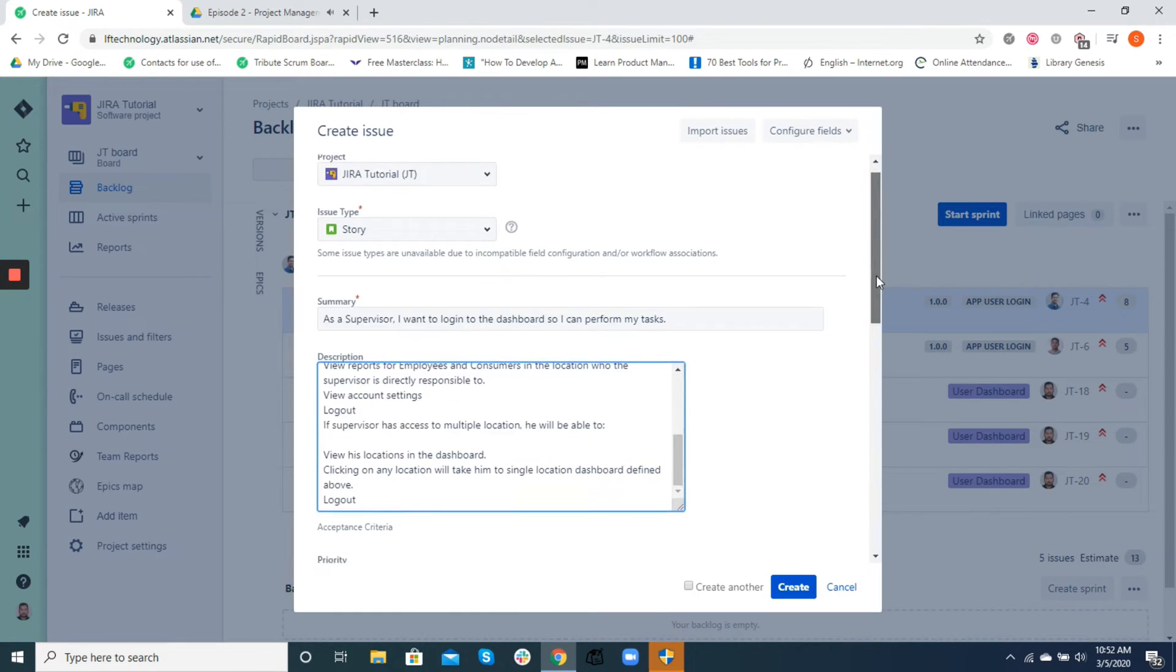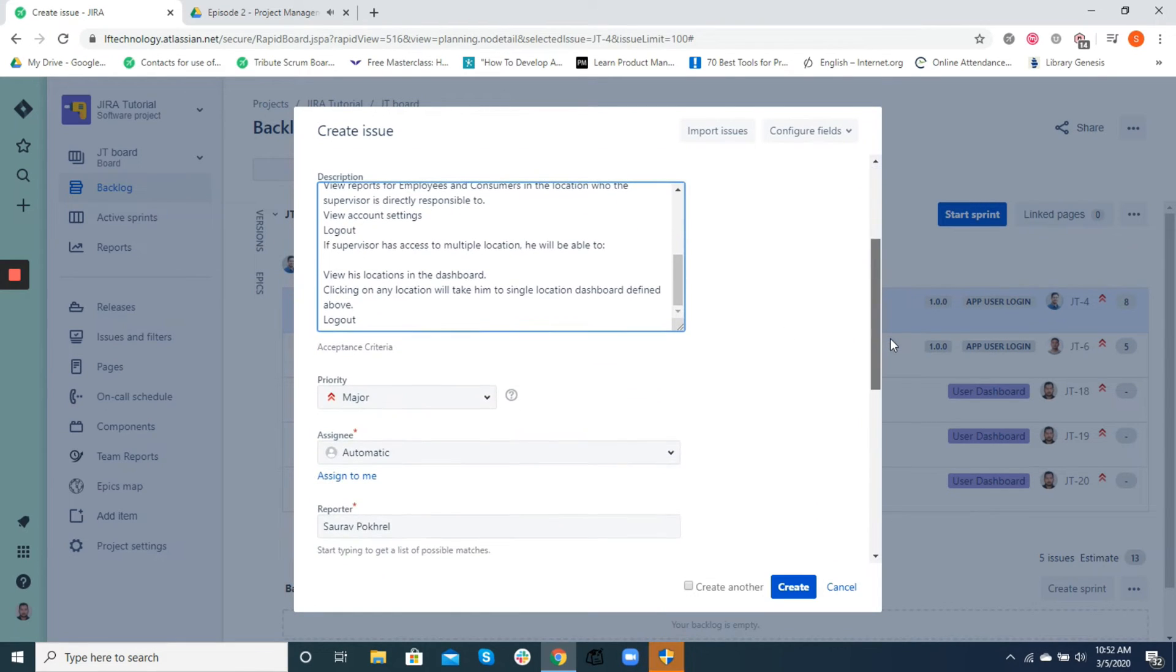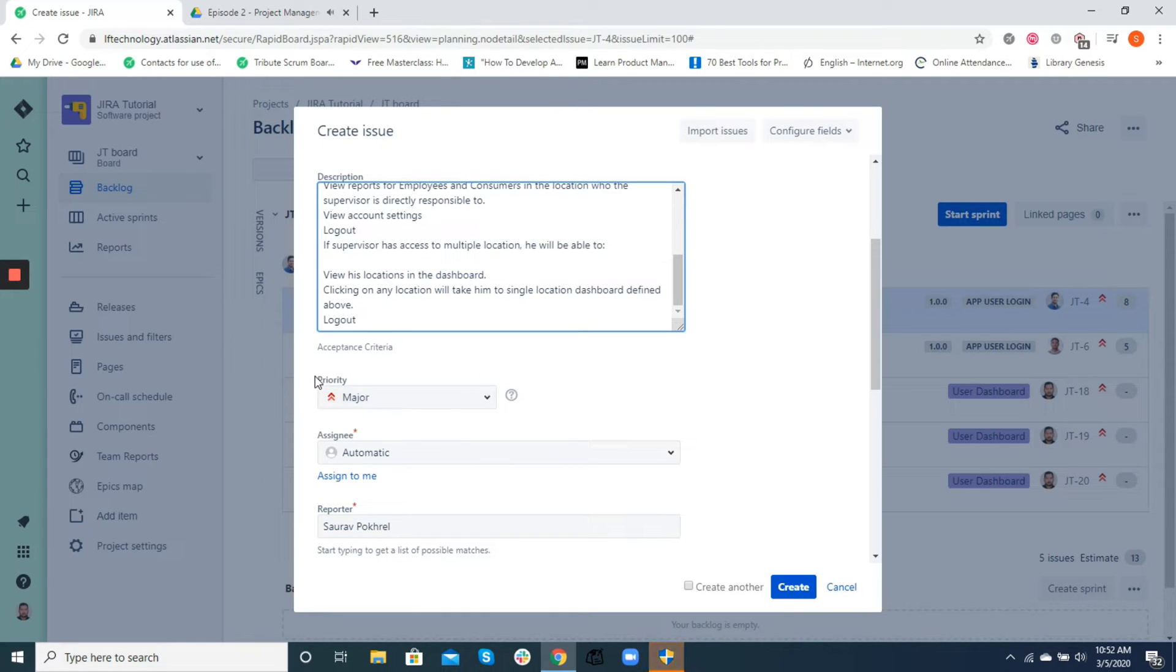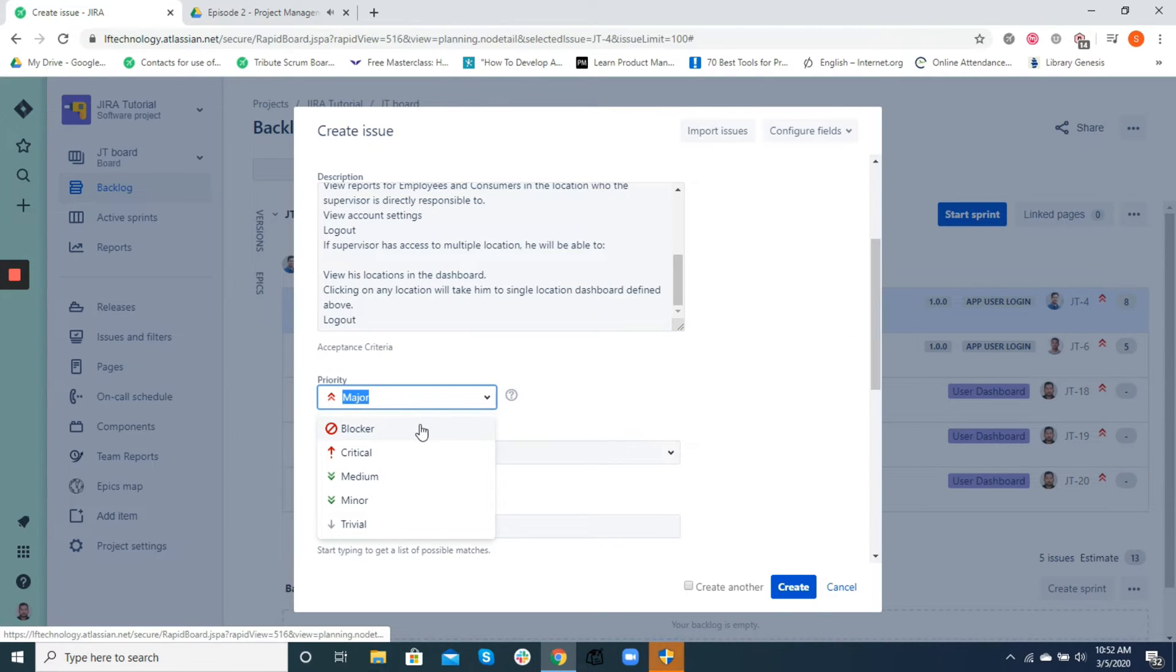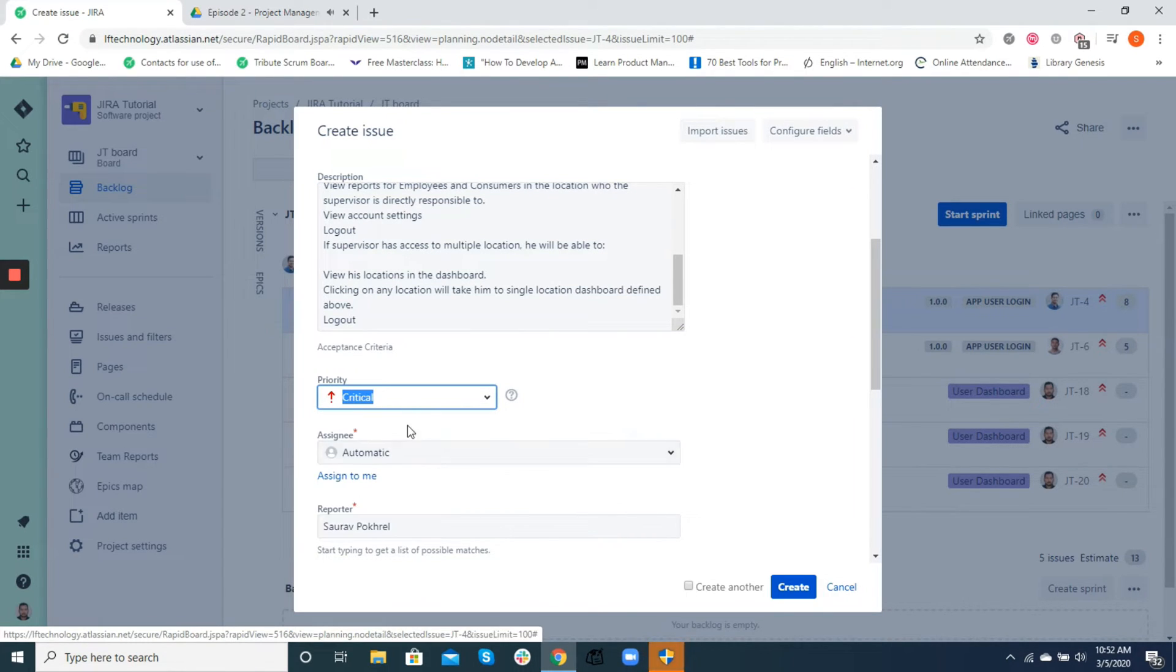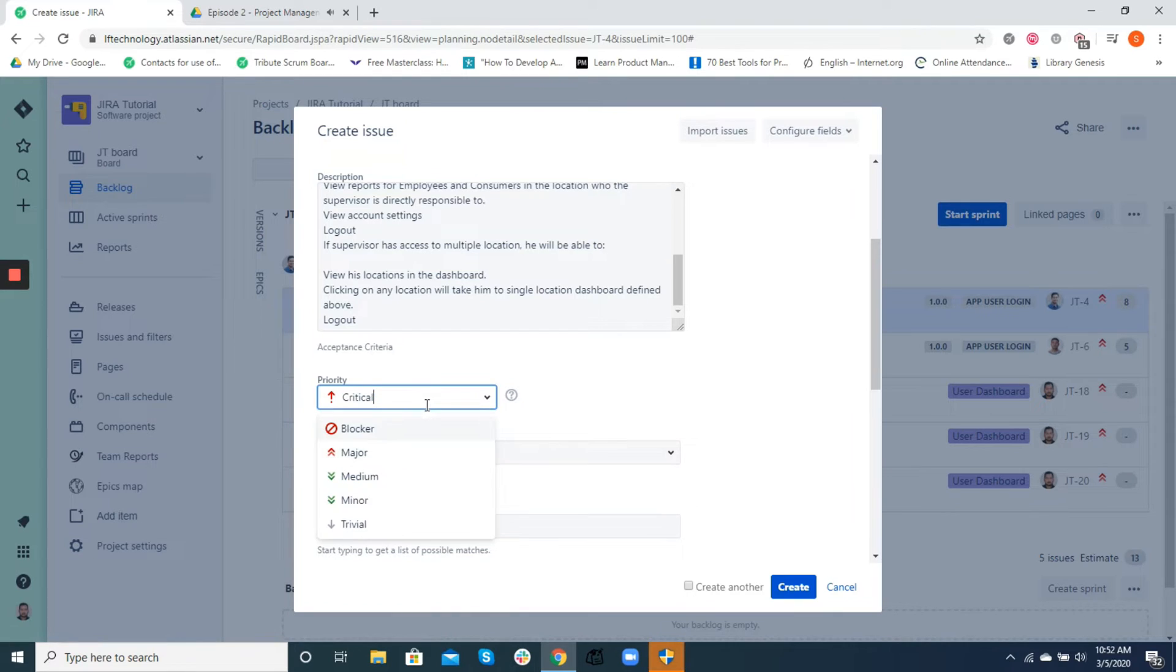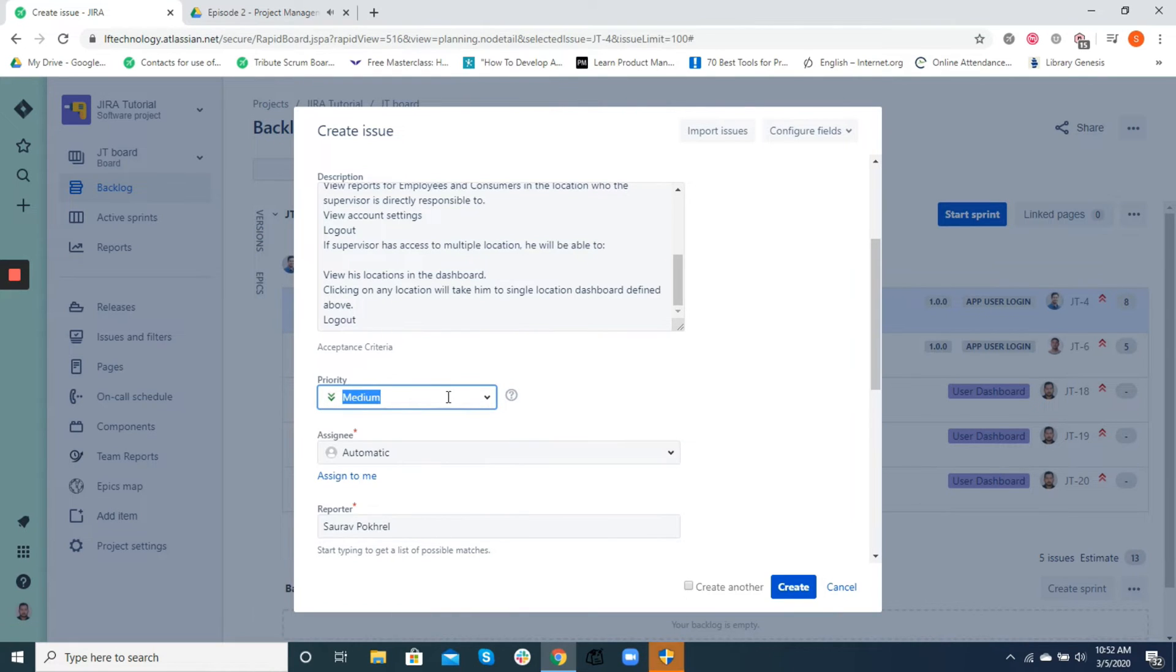Now, let's move on to the priority. As we create several tickets, we also need to categorize them in terms of its importance with the help of its business value, urgency, or the effort needed to complete that task. This is where priority setting comes in. Priority helps to identify the importance of that ticket and helps in planning or grooming our sprints.